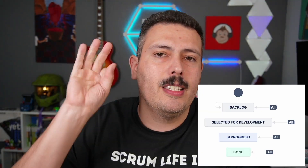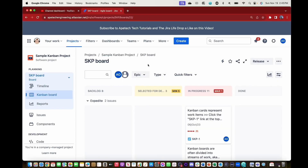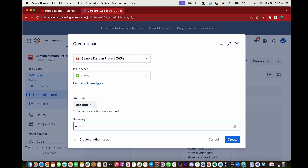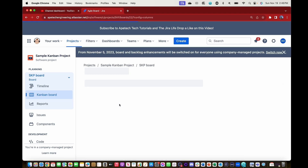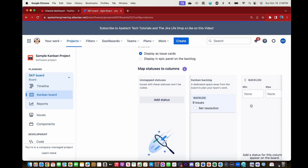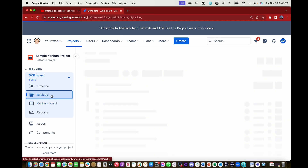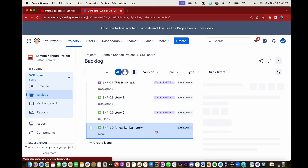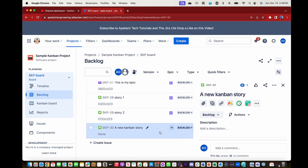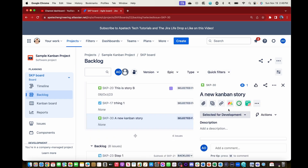When you take an item from the backlog, the sprint field is empty, and when you put it into a sprint, that sprint field reflects the name of the sprint. In Kanban, it works drastically differently. When you make a Kanban project, the default workflow is Backlog, Selected for Development, In Progress, and Done — four statuses, two of which are different from Scrum's To Do. Out of the box, you don't even have a dedicated backlog; everything shows up on the board the moment you create an issue. When you take an item from the Kanban backlog and move it into Selected for Development, you are not editing the sprint field — you are changing the status, transitioning the item from Backlog to Selected for Development.